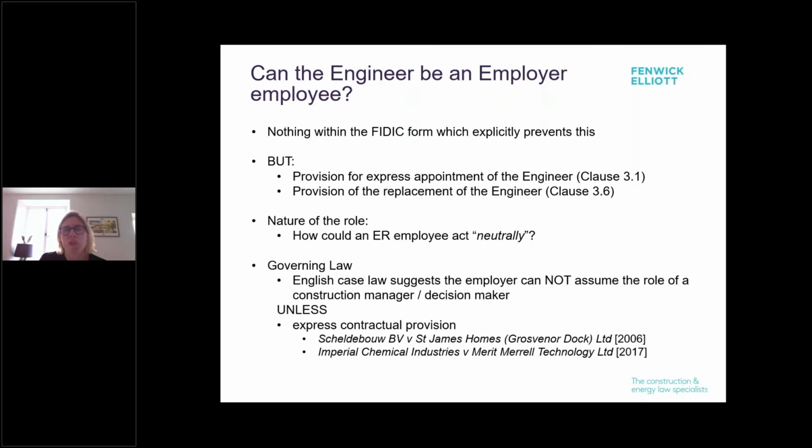And the nature of the role itself doesn't really sit well with having somebody who is essentially the employer. How can they act neutrally in circumstances where they work for the employer? Governing law as well, and certainly English case law, suggests that the employer cannot assume the role of construction manager or decision maker unless you amend the contract to make express contractual provision for it. And they're the cases in English law that sort of set that out. But again, a query whether you'd want to actually do that under the yellow or the red book, it rather knocks the balance of how things work. And as a contractor, would you want to agree to that?